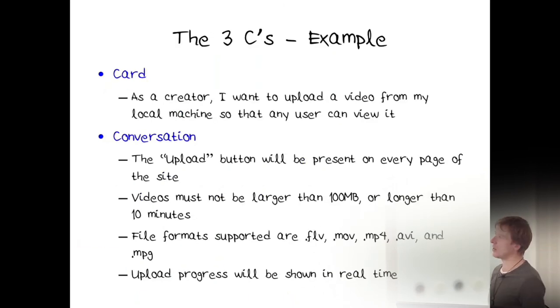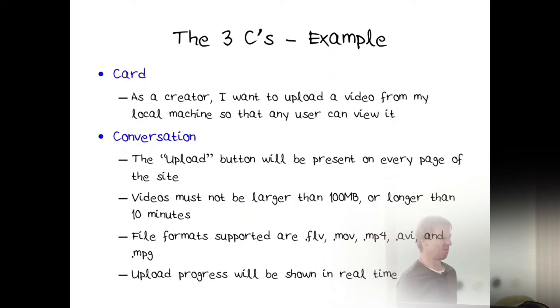So, okay, here the card said, as a creator, I want to upload a video from my local machine so that any user can view it. And now from the conversation between the team and the product owner, it's concluded that there should be an upload button present on every page of the site. It doesn't belong in the story. It's a detail, but it's important.